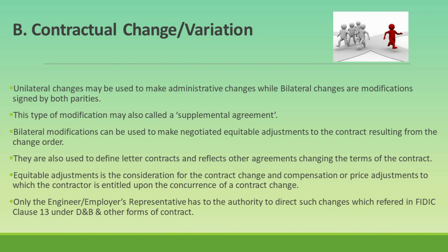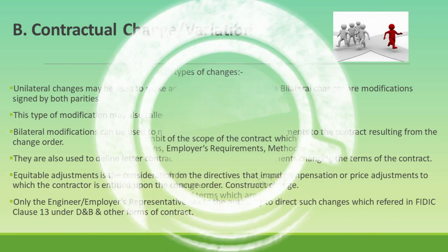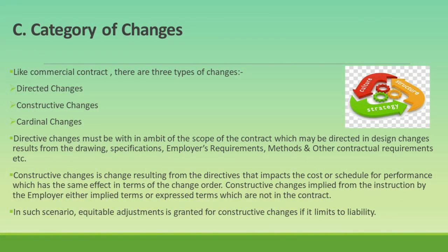Equitable adjustments are the consideration for the contract change and include compensation or price adjustments to which the contractor is entitled upon the concurrence of a contract change. Only the engineer or employer's representative has the authority to direct such changes, as referred to in FIDIC Clause 13 under Design and Build and other forms of contracts. Like commercial contracts, there are three main types of changes in EPC contracts: one, directed changes; two, constructive changes; three, cardinal changes.